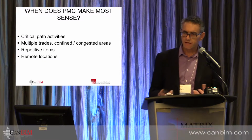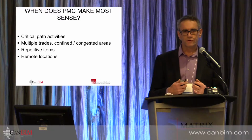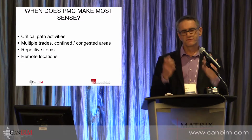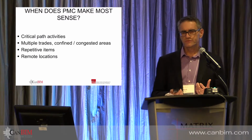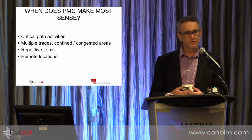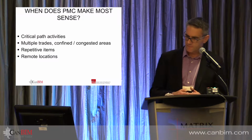Well, anything on your critical path. One of the main reasons for doing off-site construction is the ability to accelerate your schedule. So it's great that you can go and build a bathroom and install it 5 times faster by doing it off-site, but if that bathroom's not on the critical path, it's not going to save you any time on your schedule. So really we want to look at the items that are on the critical path as a key objective.